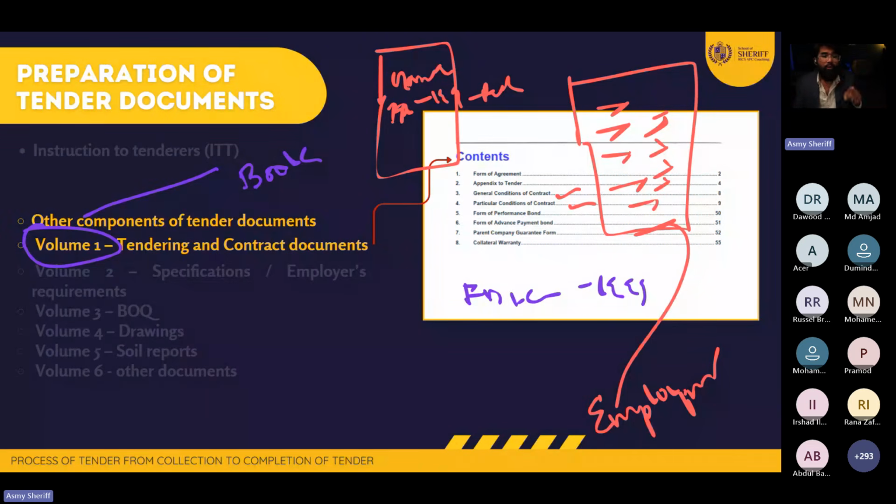So he will put, if you're going to go and take insurance, you need to take insurance for car insurance. You need to take insurance for fidelity. You need to take insurance for workers' compensation. You need to go and take insurance. He will list down the insurance. Not only that, he will tell you what are the wording that you need to include in the insurances. What are the wording that you need to include in the bond, right? So because it's a project, how is he going to provide all this document to you? Of course, he is going to prepare a specimen or templates. He's going to tell that, okay, this is how the bond should look like. The bond should have so and so information. These are the clauses. Only the gaps will be filled by you at the time of obtaining insurance.